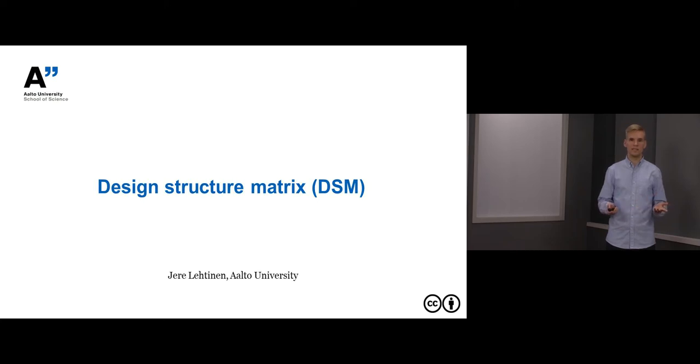Hello there, my name is Jere Lehtinen and I'm from Aalto University. Today I will introduce you to a very useful project scheduling tool called a design structure matrix. Design structure matrix differs from other scheduling tools in that it focuses on information flows instead of work or resource flows. The logic behind a design structure matrix is that information flows are easier to capture than work or resource flows.